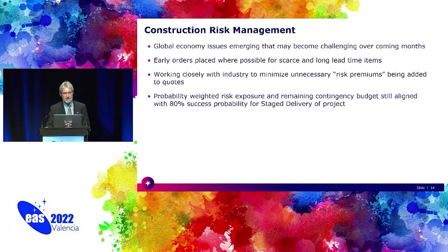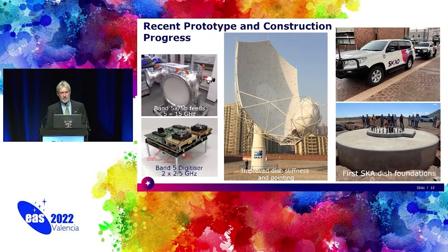So that's good news. Just a couple of quick slides showing you recent construction and prototype progress. We have improved the dish stiffness and pointing after having discovered some issues with the prototype. You see some of the feed and digitizer prototypes. Now many of the dish foundations in South Africa, the first 20 or so, are in fact poured and in place, so that's progressing well.